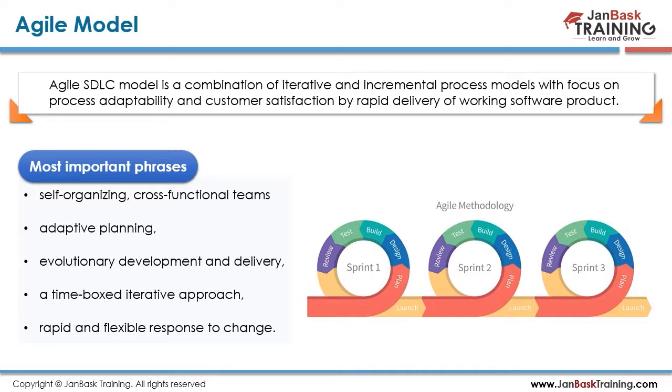By rapid delivery I mean every sprint we develop and send it back to the client and say, hey, this is what we did in sprint one. Can you review that? If there is any feedback, let me know. If the feedback is positive, that's good, we don't have to do anything. If there are issues or concerns, we're going to get it done in sprint two, in sprint three, and there are further sprints we can use. So see, we have not wasted much time.